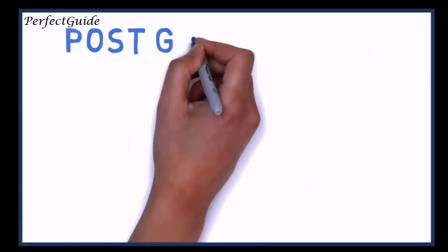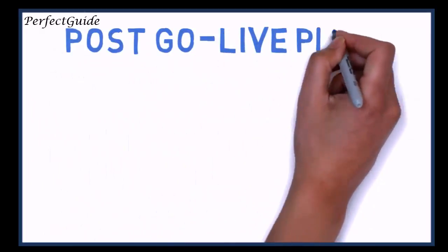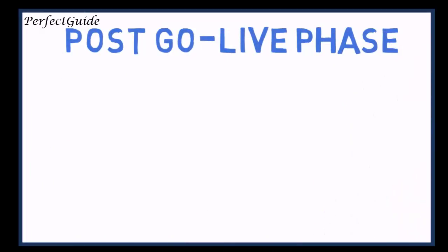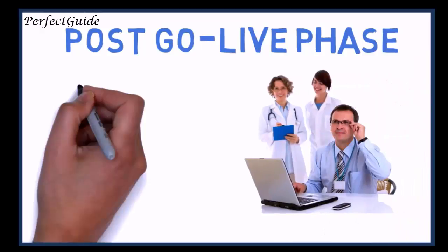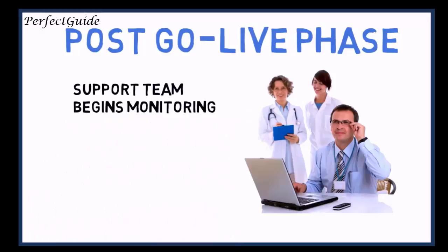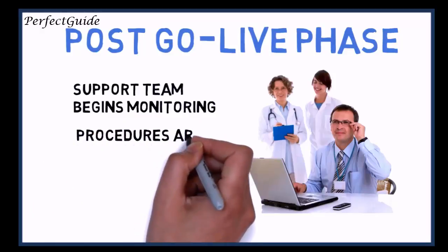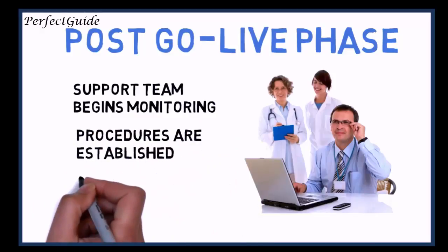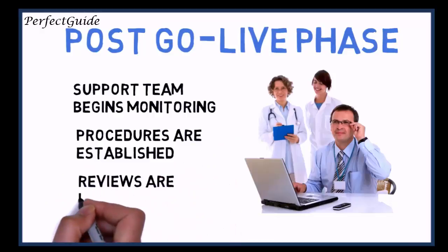The post-go-live phase begins when the production support team takes over monitoring the system and resolving live EHR-related issues. Proper change management procedures are established and ongoing end-user training is conducted. Plans are made to continually review and improve EHR functionality and processes.